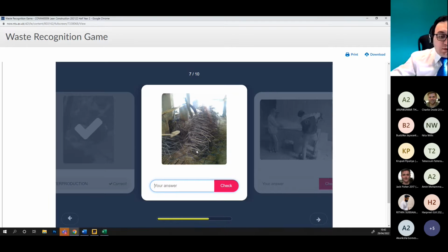So this physical waste is a consequence of overproduction. That's why I'm saying you shouldn't focus on the physical waste. You should focus on these lean wastes. Yeah, because they are usually extra materials, extra components that are produced but haven't been used, so we don't need them anymore. The structure is done, and these are physical waste. Now, that is the consequence of overproduction.